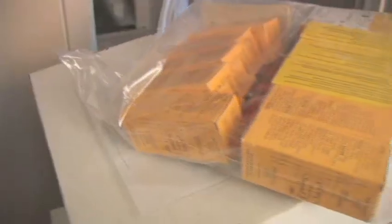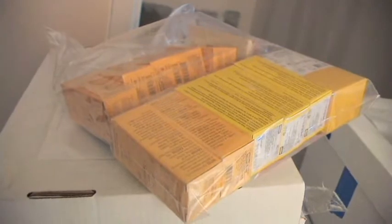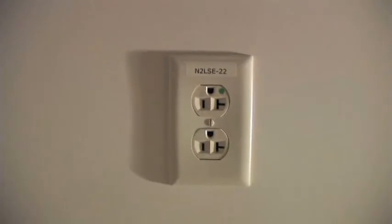On Phase 2, everything that the craftsmen and women need to complete their work is packaged together. We have a plan view with everything that would go on the walls on the first page, and then every one of the walls that's in the room has its own page, and on each page it has the elevation of every one of the devices, the type of device, the circuit number for the device, and just about anything that's incorporated in that room is shown on the drawing.